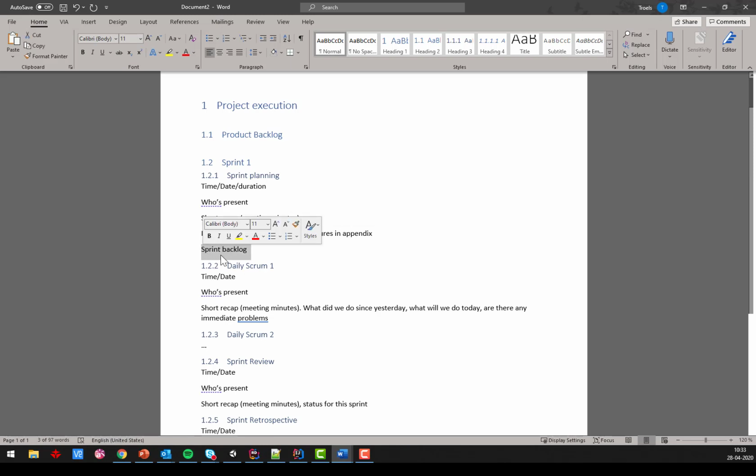And then you show the sprint backlog. This is the result of the sprint planning meeting: what do you actually plan on working on? So the sprint backlog contains both user stories and their subtasks, and everything else you plan on doing: setting up GitHub, fixing bugs, writing reports, refactoring code, whatever, right? Everything you plan on doing for a sprint should be in a sprint backlog task. And if you're working on something that does not belong to a sprint backlog task, you should probably not be doing that. And if you really must be doing that, then it should go on the sprint backlog.